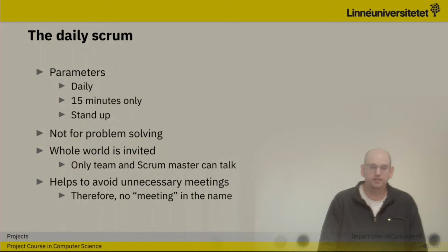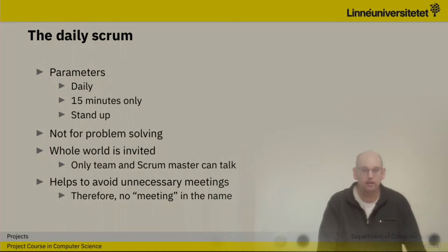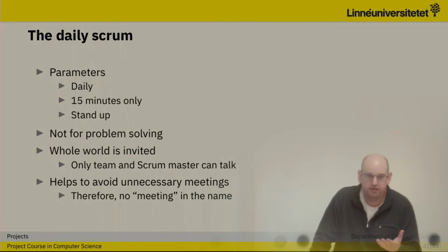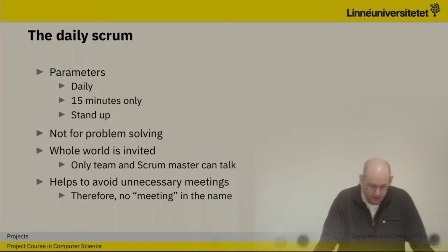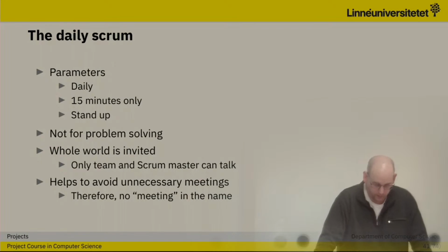As the name implies, it's daily, and with daily it's of course working days. 15 minutes only, standing up. It's not for problem solving, it's for just saying how things are. We'll come to that. The whole world is invited, so anyone should be able to attend, but only the team and the Scrum Master, who is part of the team, should talk.